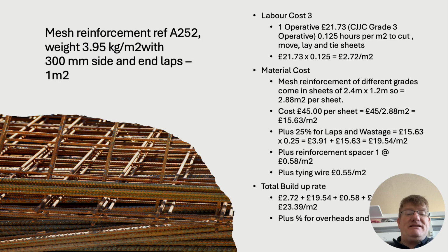Mesh reinforcement, measured in metres squared. One operative, high grade operative, because he's a steel fixer, so semi-skilled. 0.1525 hours. Doesn't take long to cut, move, lay and tie the sheets. £21.73, times 0.125.